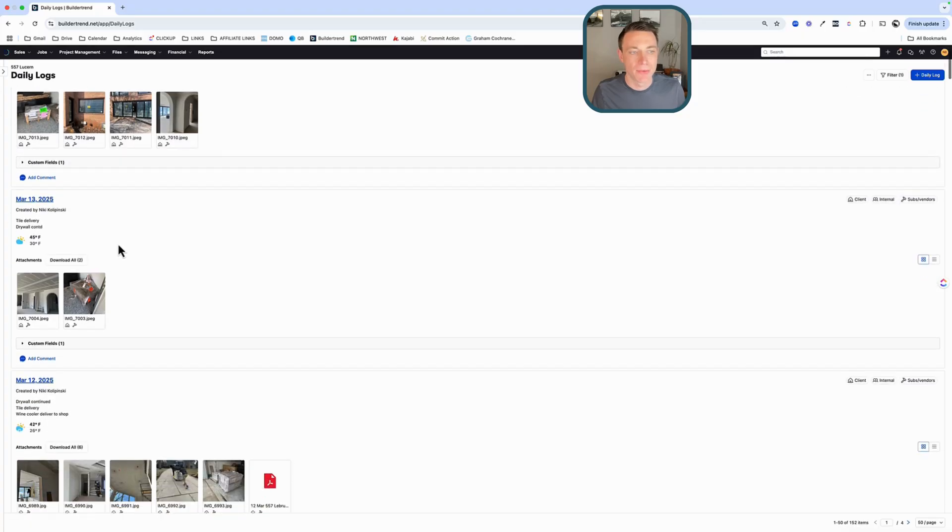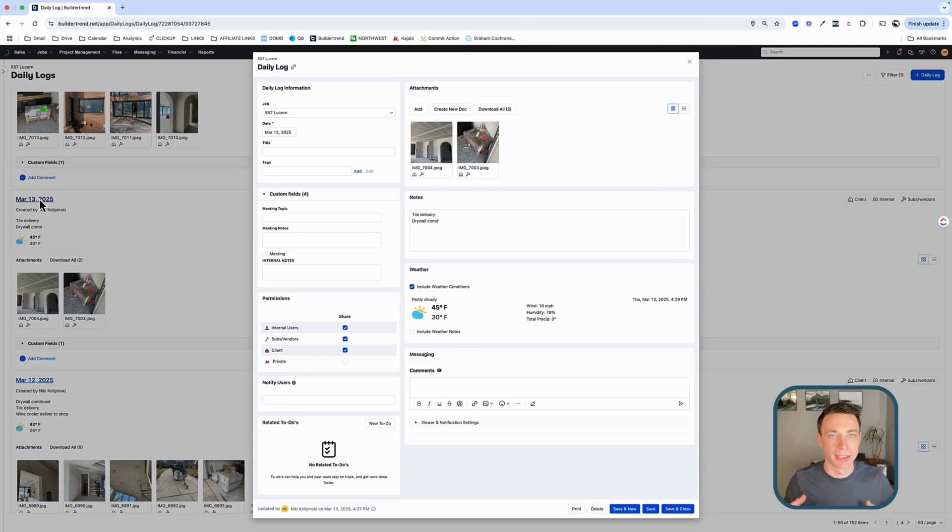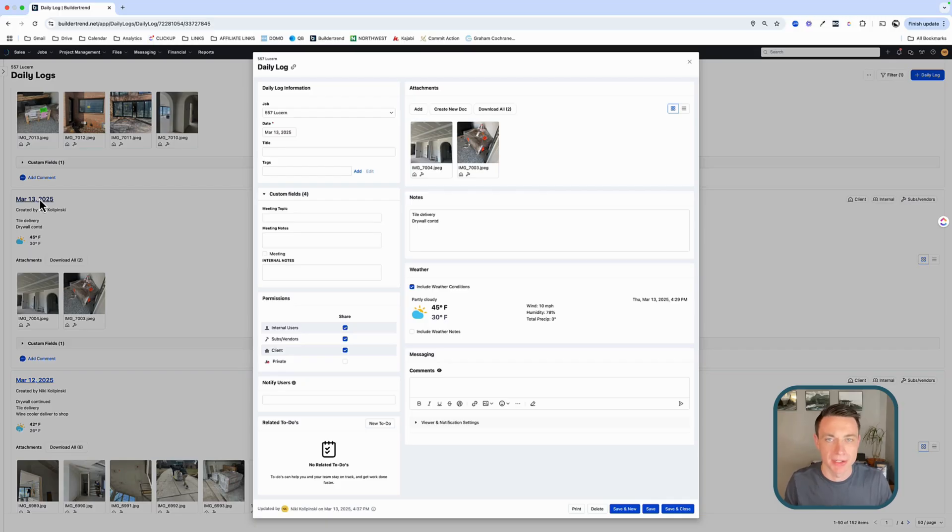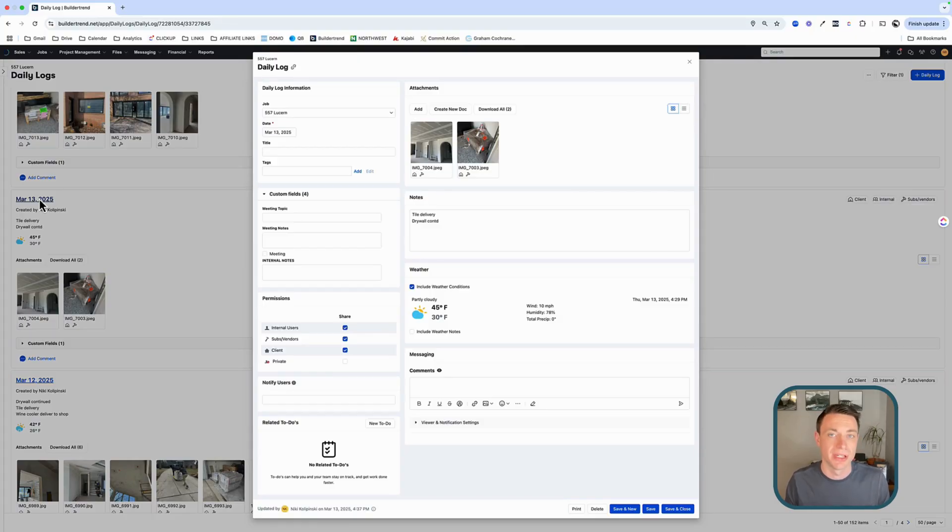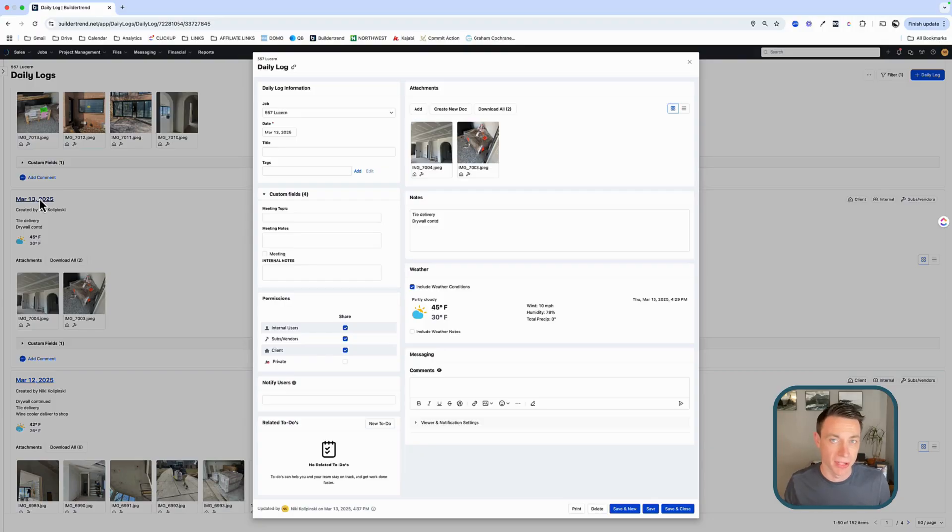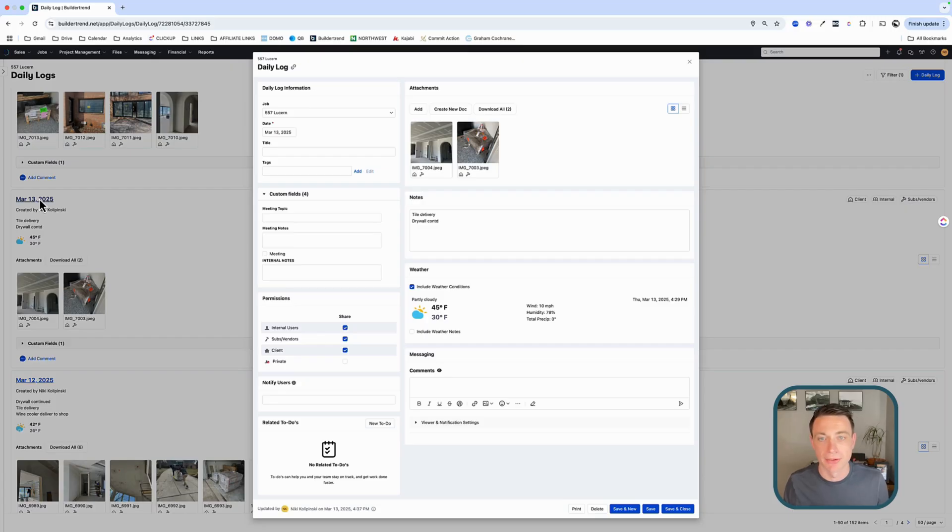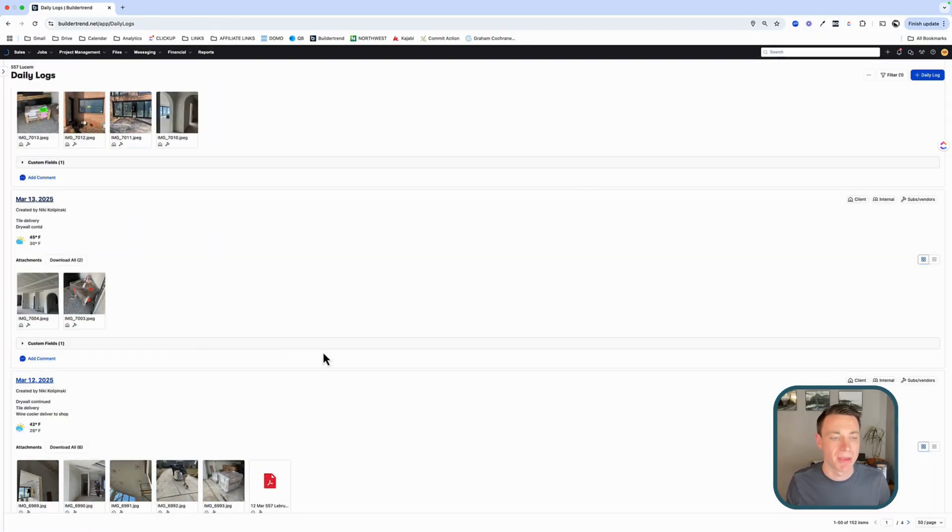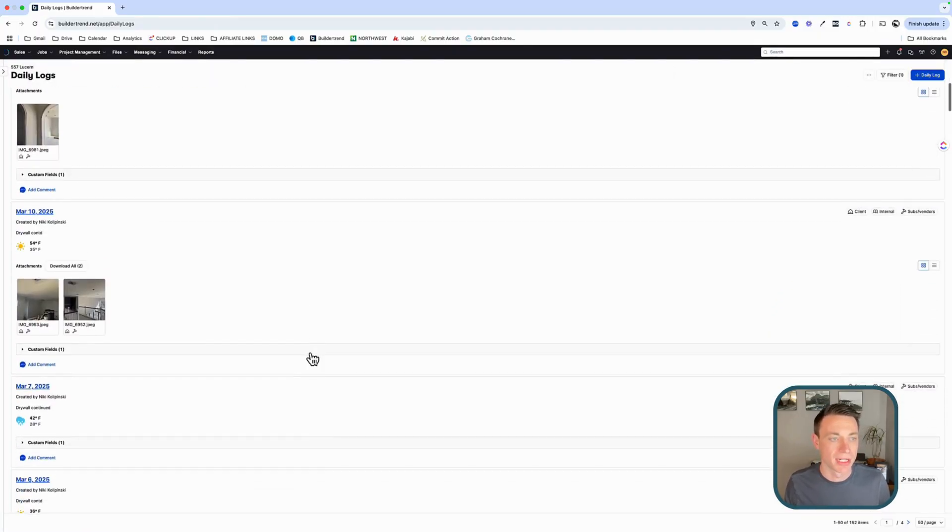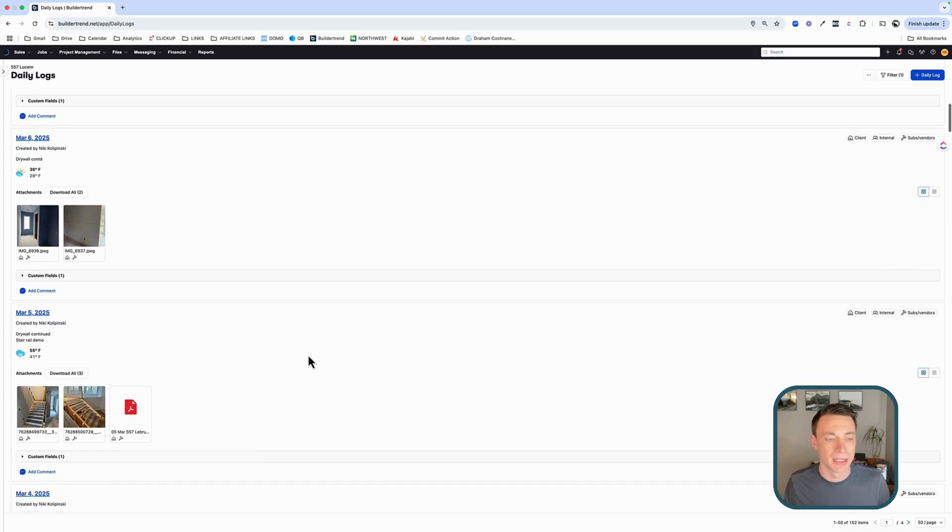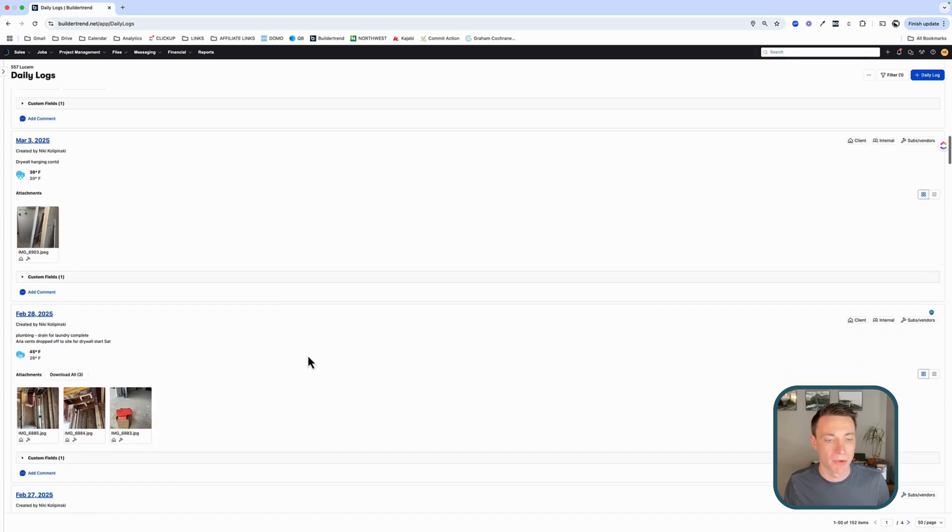I would implement a 100% daily log strategy. What I mean by that is that every day that the project is going, every work day that the project is going, you should have a daily log. Even if your team is not on site, you should have a daily log. So who is it on your team who's responsible for those daily logs? Is it a project manager? Is it a lead carpenter? What is the process through which we are establishing accountability for this? If we don't assign somebody to it, it's not going to get done. So we've established a lead carpenter model. Lead carpenters are responsible for creating daily logs and the project manager is responsible for creating a daily log if and when the lead carpenter doesn't add one.